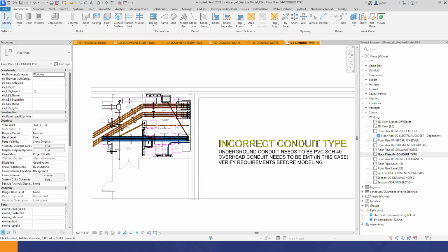My first thought is, these submittal packages don't change all that much project to project. Your PM probably has an older project that they do have the submittals for, and maybe you can pull that from there. But I'm curious, Jared, what recommendations do you have for that? Well, that's my recommendation.